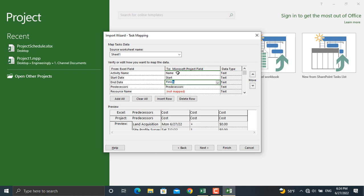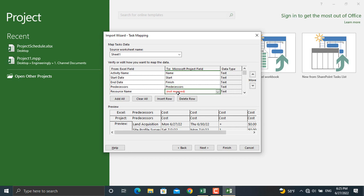Since we typed the predecessor exactly as it is in Microsoft Project, Microsoft Project has identified it itself, so we don't have to write down anything else in here. And the last thing is the resource name. So we will write down in here 'Resource Names.' For the cost it's 'Cost' in here, and then we'll click next.